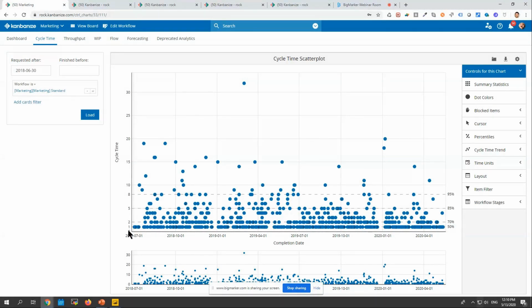And if you're wondering why is this useful, here's why. Imagine you get a new request coming into this workflow, and you naturally ask the question, hey, how much time do I need to get this done? Then you can instantly say there is 95% probability that I will complete this work item within 8 days, as long as it's something like what we used to do here.